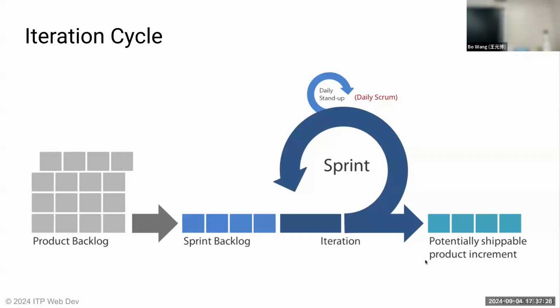And then the daily check-in. The reason we have a check-in every day is the so-called daily scrum, right? How's everybody doing? I finished my part, how about you? It just gathers the workforce, making sure things are moving along the right way. It takes about 5 to 10 minutes per day to check in with each other. And then at the end of the sprint, we'll try to make this product shippable. Shippable means deliverable, deployable, usable, right?